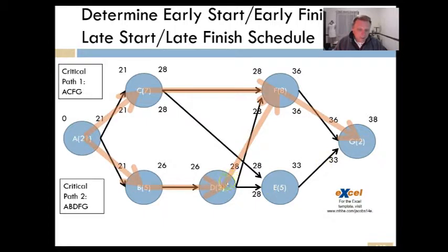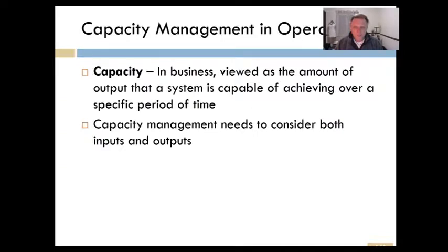Even though this is a little bit shorter, this will actually get done sooner, and this activity will be done waiting. This activity can't start, though, until both are complete. So 36 weeks before this is done, 33 before that's done, and then this can take off and go. So that's the real brief review of the critical path. Again, there's some more in the text about that.